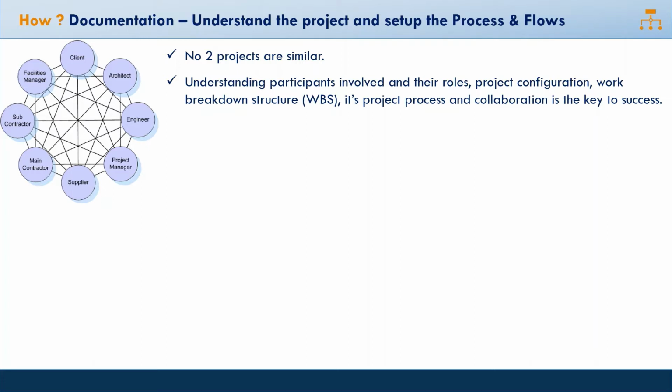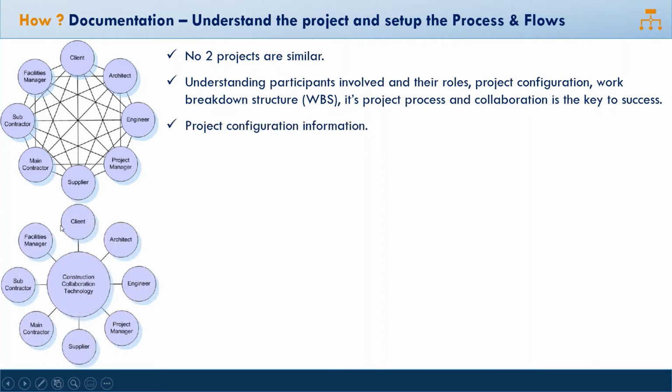You've got to understand this first, then only you'll be able to set up the document control system on the project properly. So it's very important to understand all these before setting up the document control process on the project. Having a centralized configuration is very much recommended, where every piece of information of your project documents and records stays in a centralized location, and everyone approaches the centralized system to avoid miscommunication, misunderstanding, delayed collaboration, delayed replying, overlooking of emails and communications, and delayed review approval cycles. So it is very important to set up all these projects in a centralized system.